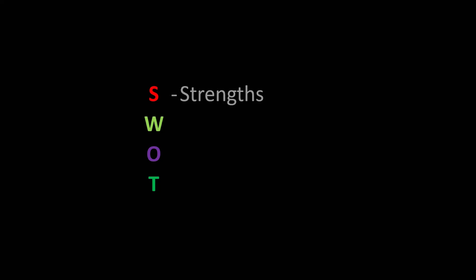Let's move on to the second tool we need to look at: the SWOT analysis. Just like PESTLE, each of the letters in SWOT are indicative of an area we need to examine. S is for strengths — here we look at our own organisation, team or self. It's looking at our internal environment and what we are good at. Some examples could be: we have a strong financial position, we have an experienced project team, or we own critical patents.